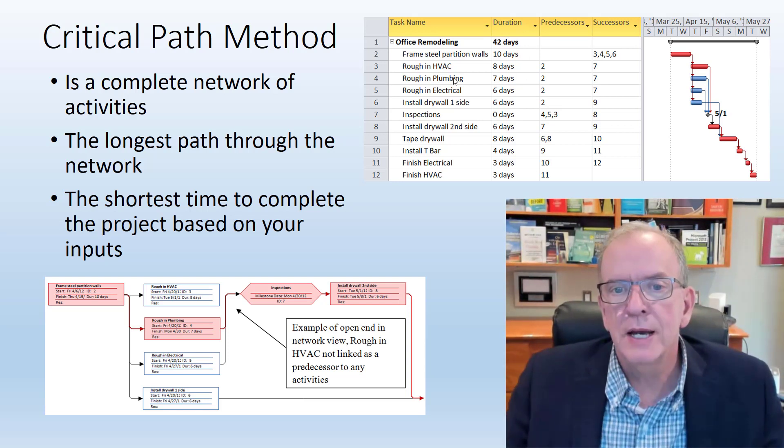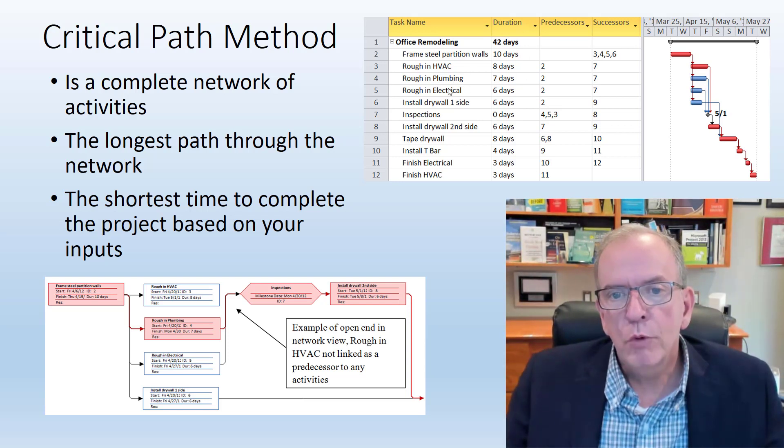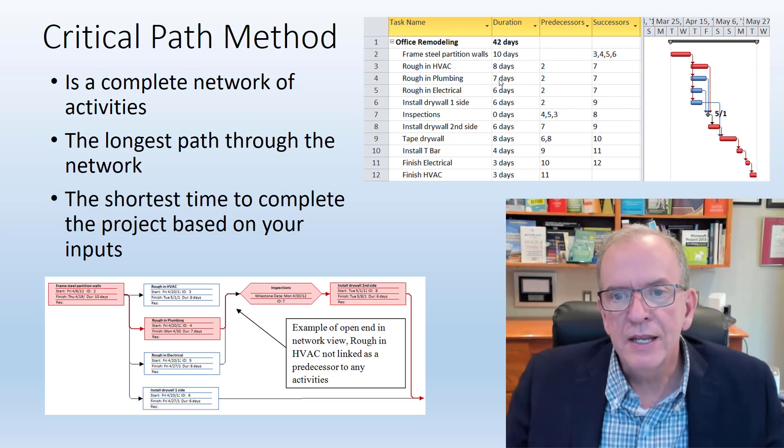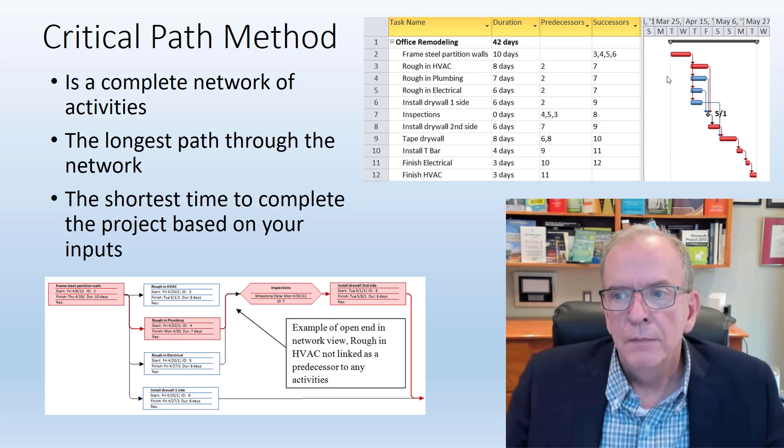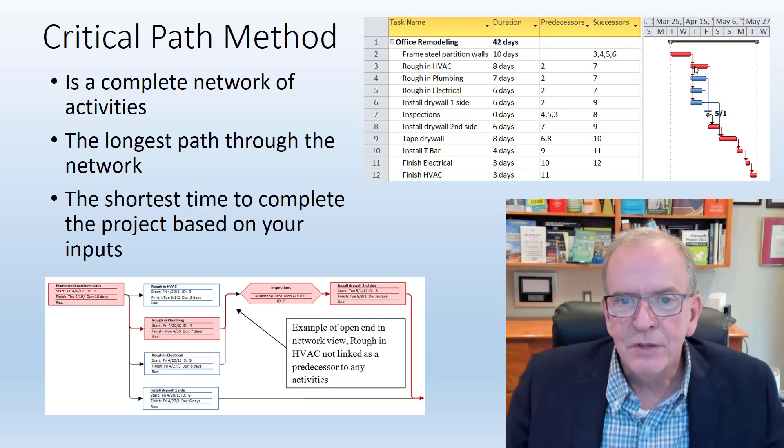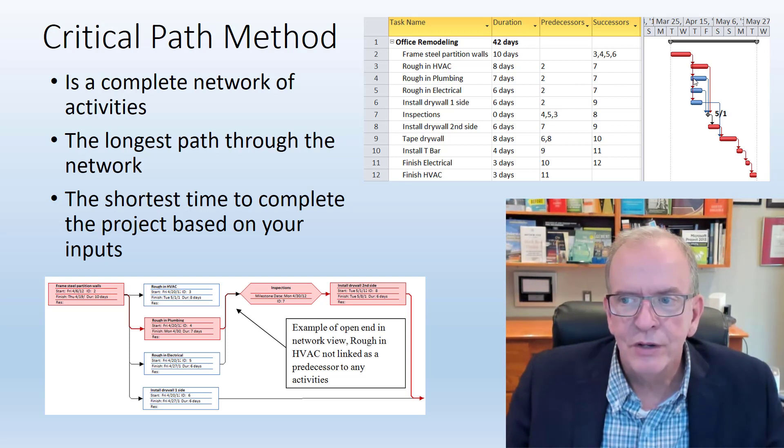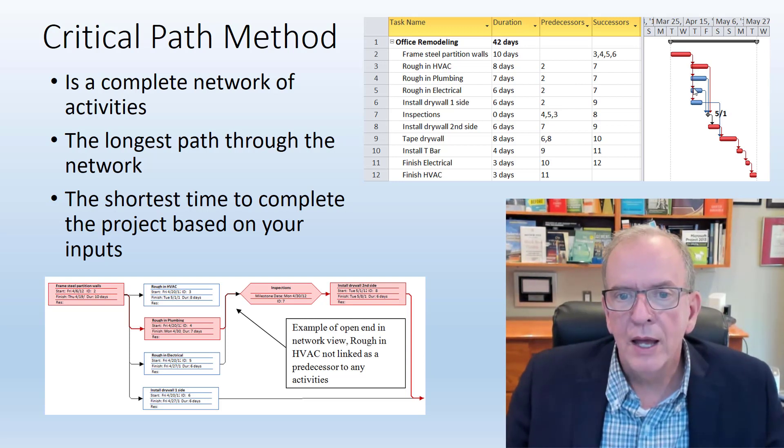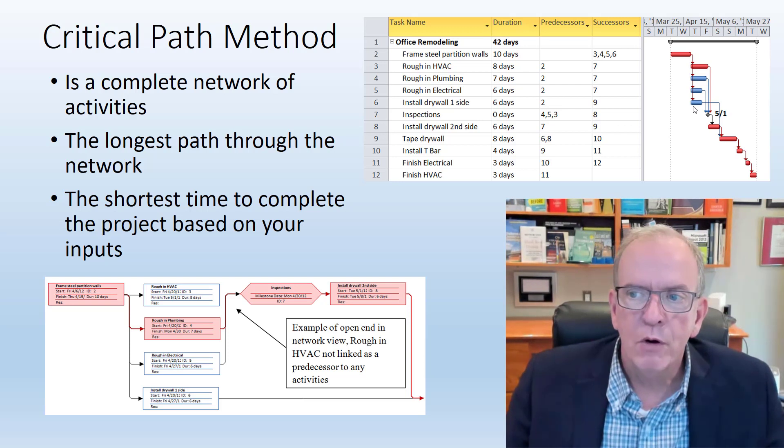For example, this rough-in plumbing activity, I can tell because it's basically starting at the same time as rough-in HVAC, which is on the critical path, as well as rough-in electrical and install drywall first side.